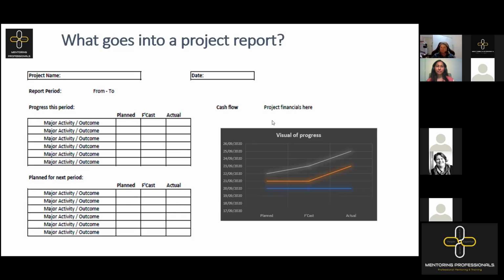No, I suppose not. Because of an escalation, wouldn't it? That would be an escalation. And again, it's something that comes with managing by stages. It is in fact making sure, of course, that those resources that we need for that next particular phase are in fact available to us. And if there are issues with resources, then that actually needs to be escalated up to the board immediately.